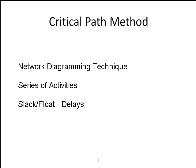Slack or float means delays. In other words, it's the amount of time an activity may be delayed without delaying a succeeding activity or the project finish date. The longest path containing the critical task is what is driving the completion date for the project.